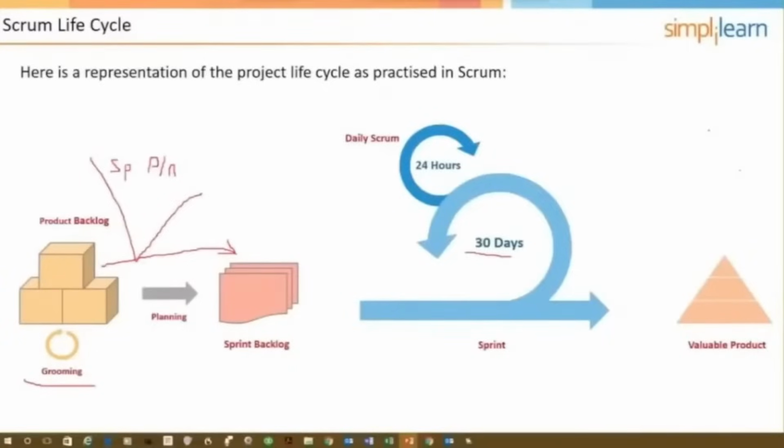There will be a daily scrum like we did at the beginning of our workday together as our team. And then at the end of the work of the sprint, there will be the sprint review. The sprint review meeting or ceremony is also time-boxed, and it is time-boxed to 1 hour for each week of the sprint.